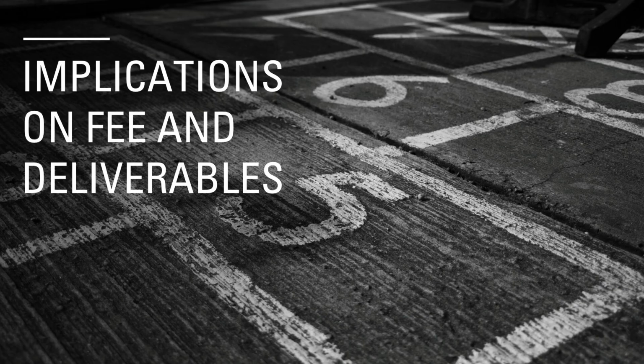Third, we must address model ownership. Unless clearly defined in the contract, the BIM model is just a means to produce drawings. If a client or contractor requests the model for clash detection or FM, should they receive it for free? Opinions vary, but the safest route is to clarify ownership and usage rights contractually, not retroactively.